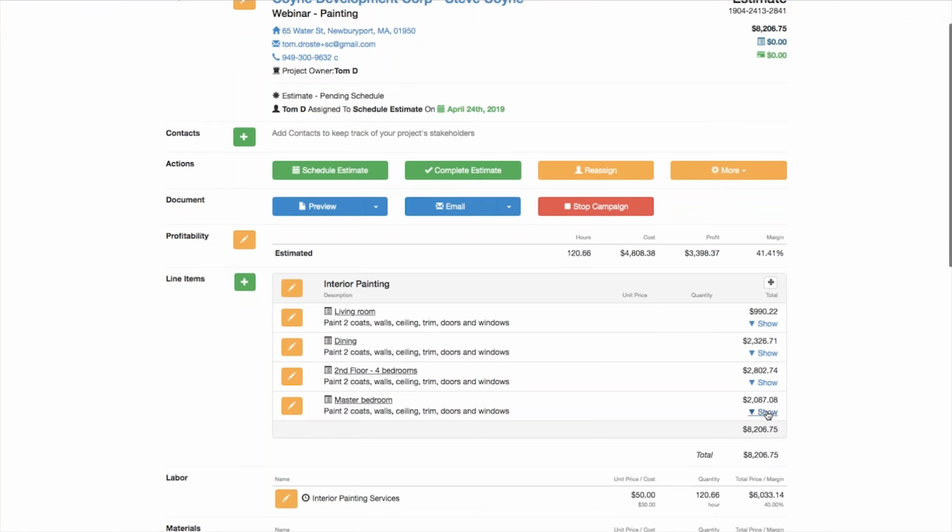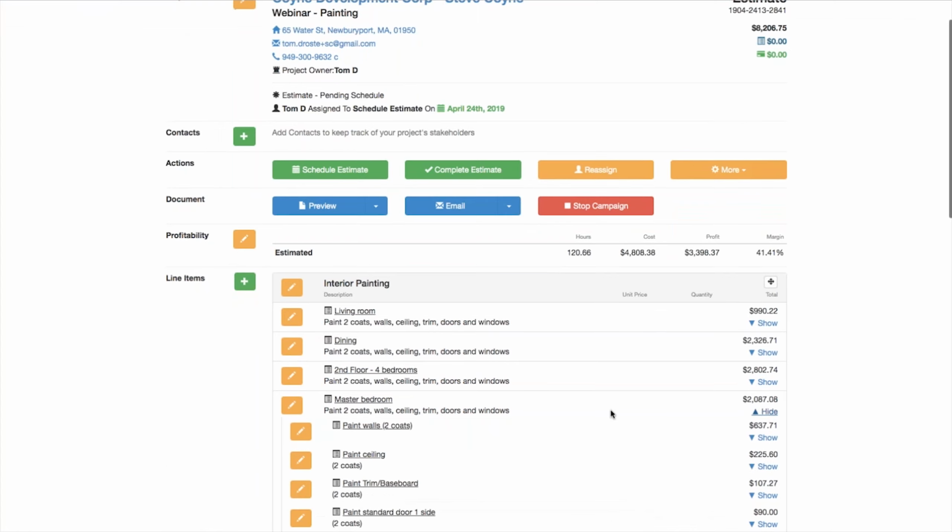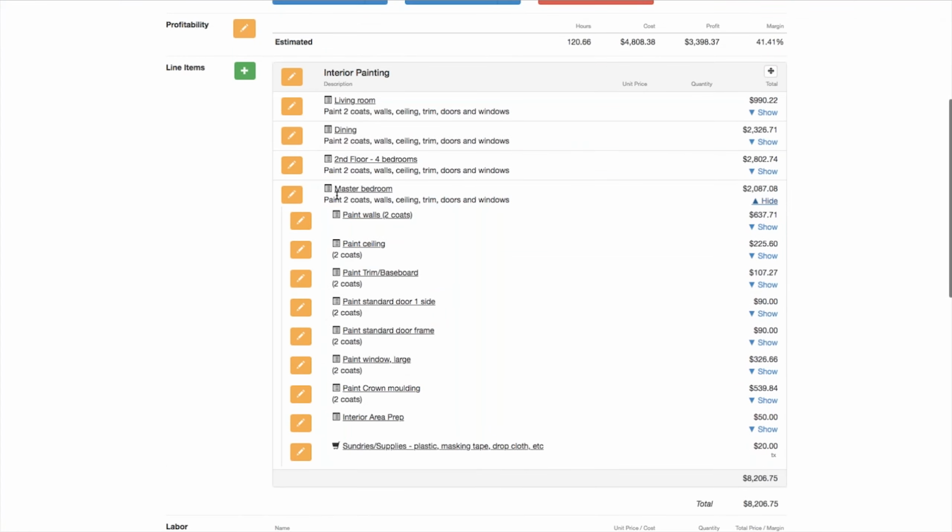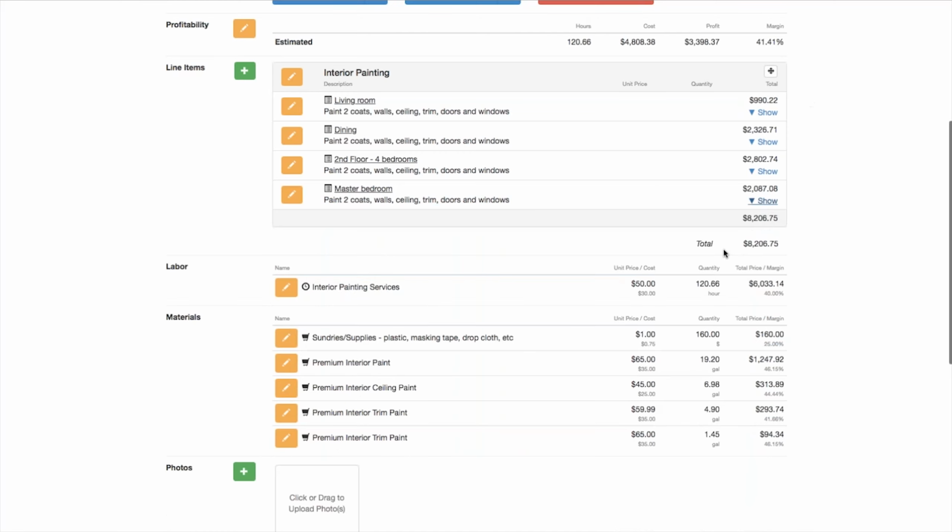And what that just means is that there are items underneath the line item that the customer is going to see. So they're called nested line items. So these are all the items from the template with the information that we filled in and individual prices. The customer, of course, is only going to see what's at this summary level. So the customer is not going to see these details. Now, there is an option when you're using item templates. I'm going to show you that right now.